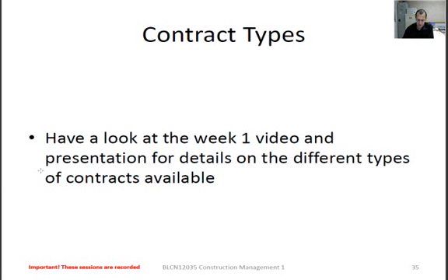For instance, if you look at number 3, it says a single point of responsibility for a greenfields multi-project complex, including interface management, where the contractor is responsible to pay all subcontractors. And there's your hint, where the contractor is responsible, because it becomes a management type contract. So you have to think, all right, what? Yes, I was looking at a design management managing contractor.